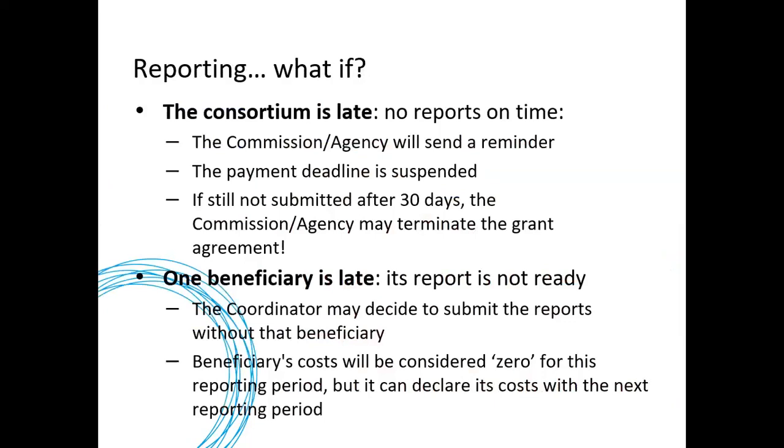But what happens if only one beneficiary is late? This, of course, will not hold up the whole consortium, and the coordinator may decide to submit the reports without that beneficiary if this one beneficiary is late. And in this case, the beneficiary's cost will be considered as zero, so no reporting for that period. The beneficiary can have the chance to declare their costs in the next reporting period.